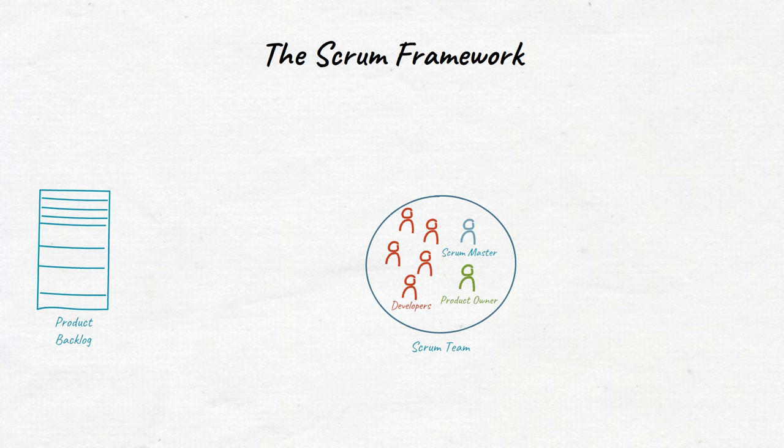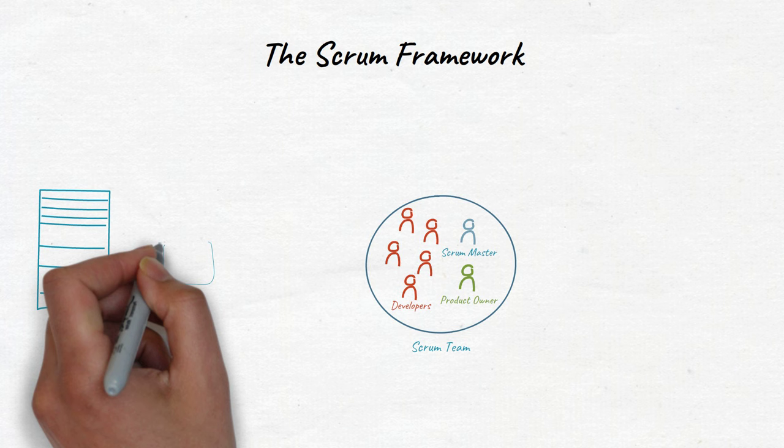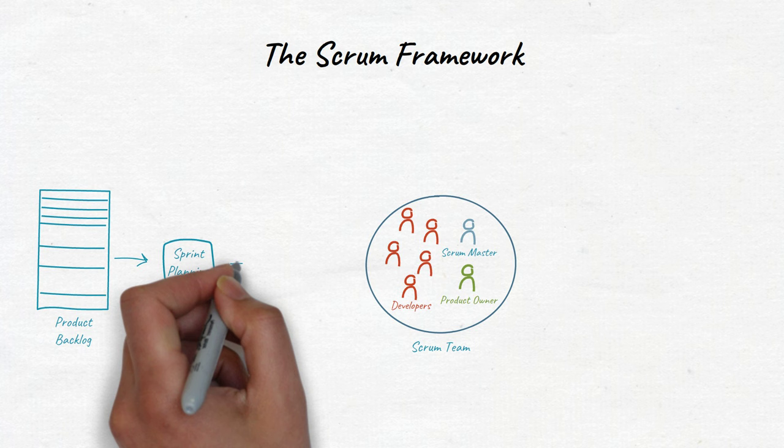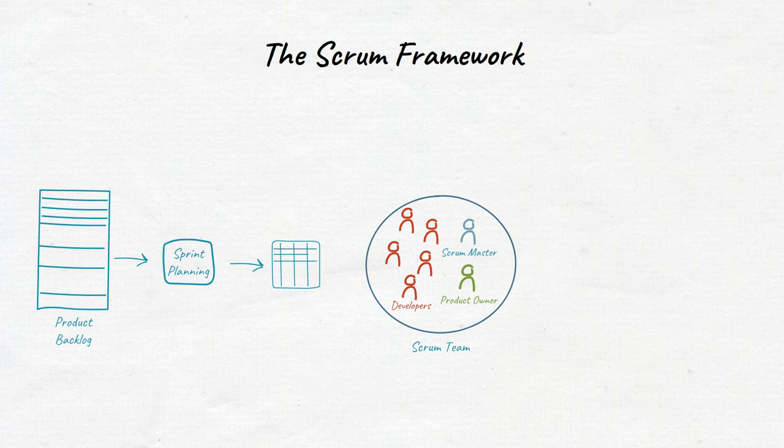The Scrum team meets at the start of every sprint in an event called sprint planning. During sprint planning, the sprint backlog is composed of the sprint goal (why), the set of product backlog items selected for the sprint (what), as well as an actionable plan for delivering the increment (how).